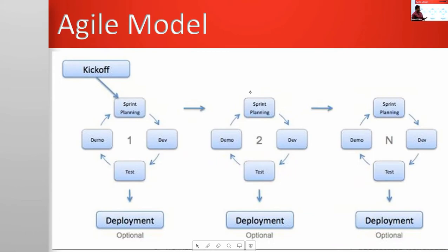Consider 2-3 major business requirements to implement in one short schedule. Rather than asking developers to develop 40 requirements and testers to test 40 requirements, it will be split like this. This week, you develop the home page, login page, and user registration page. You write scenarios and test cases for testing user registration, login, and home page. We test and finish this.